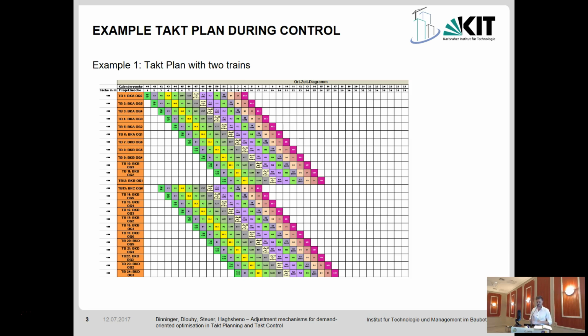And we can do it in different ways. You can just fill different tasks into different boxes. And you can also do it in such a way that you create a kind of flow. And what we figured out is that you have different kinds of flows within a tech plan. So you have the horizontal line. This is the client's perspective. And for the areas, you have different flats in this example.